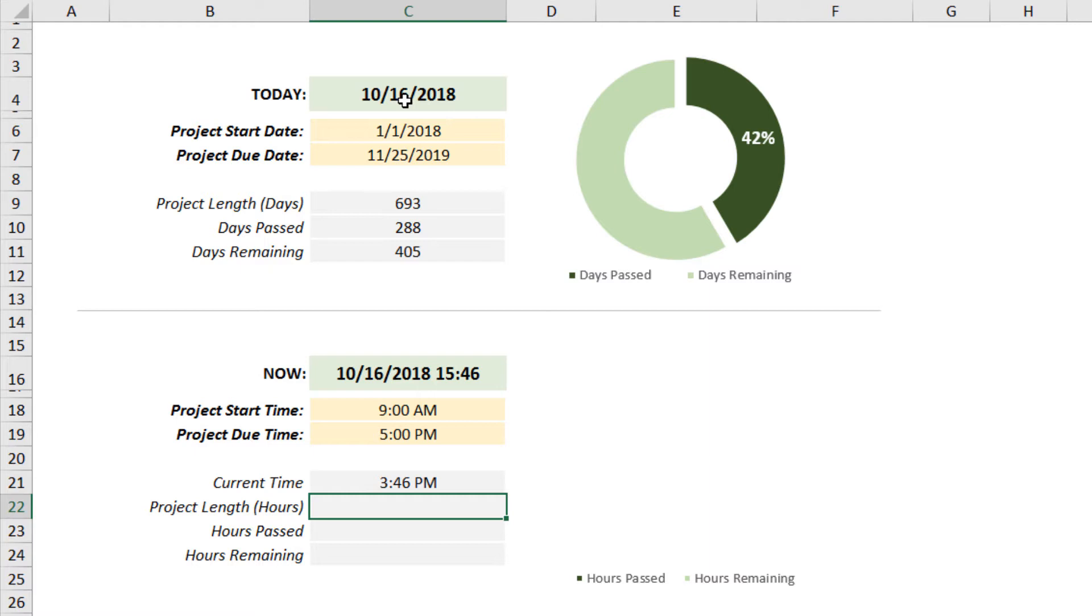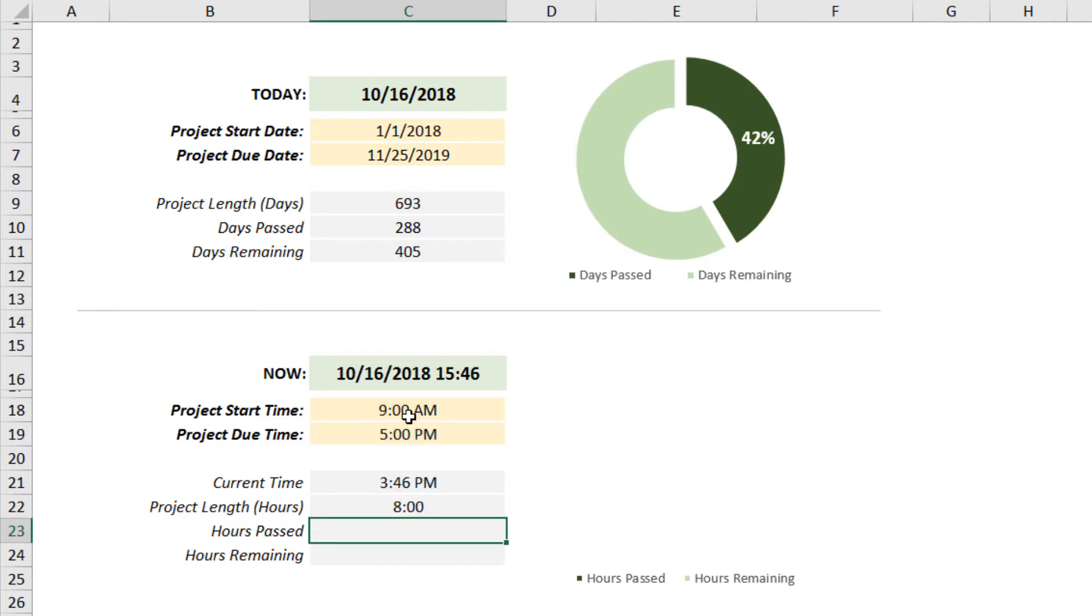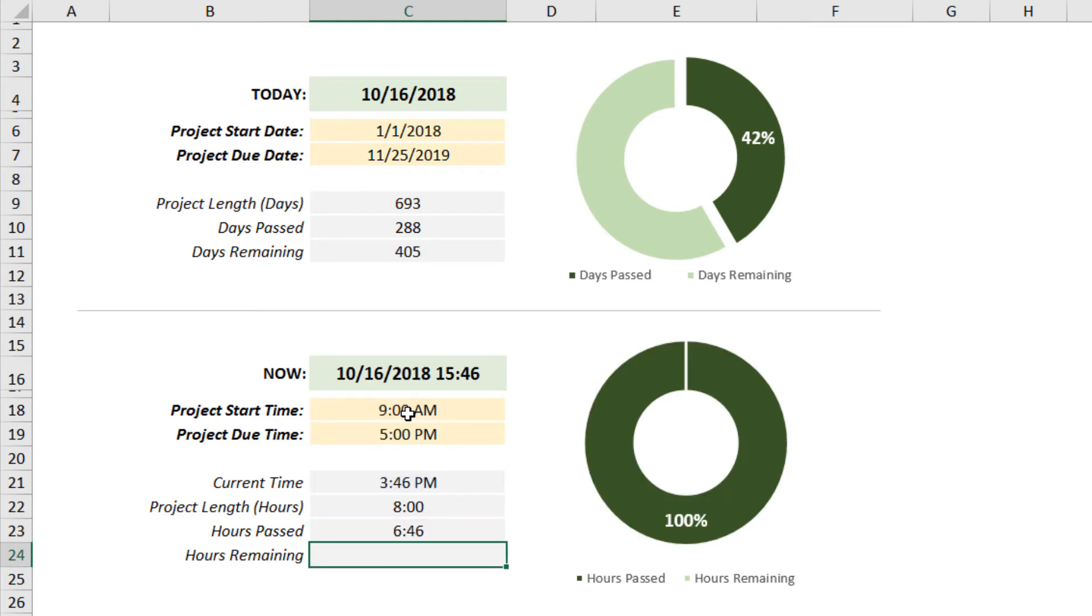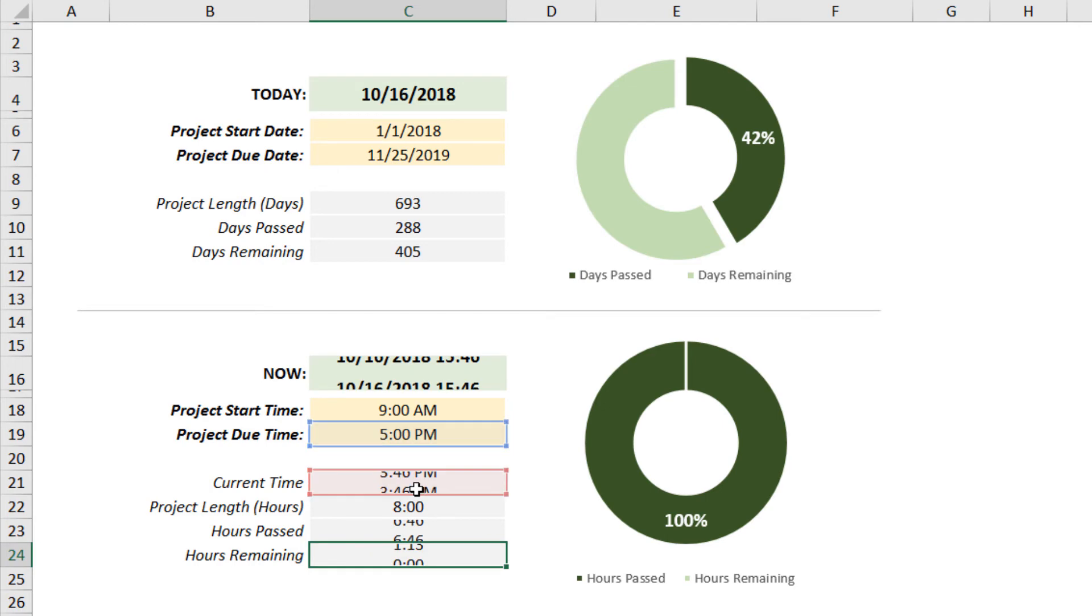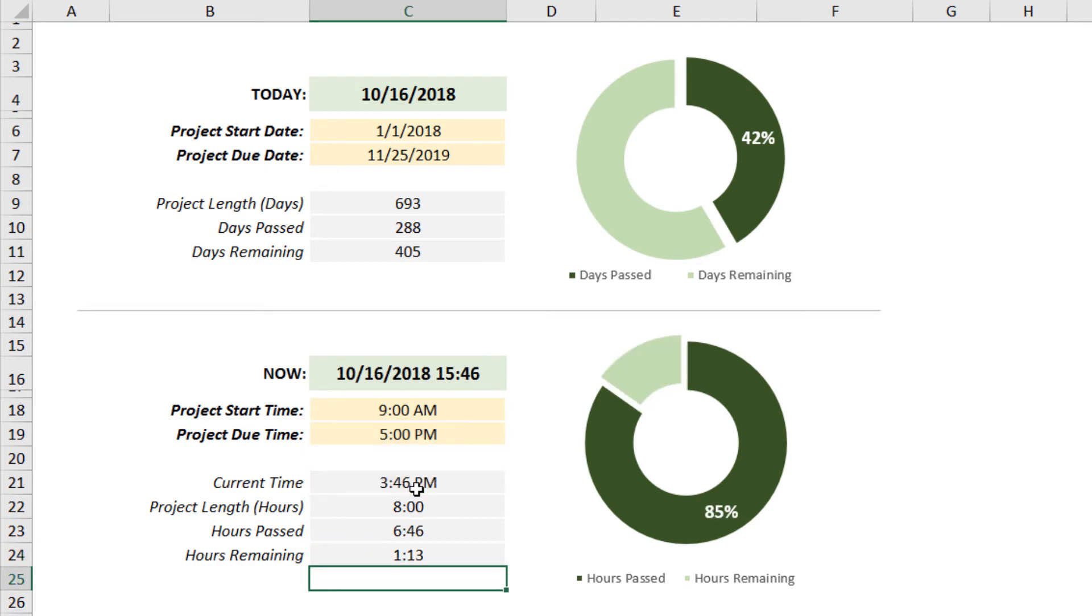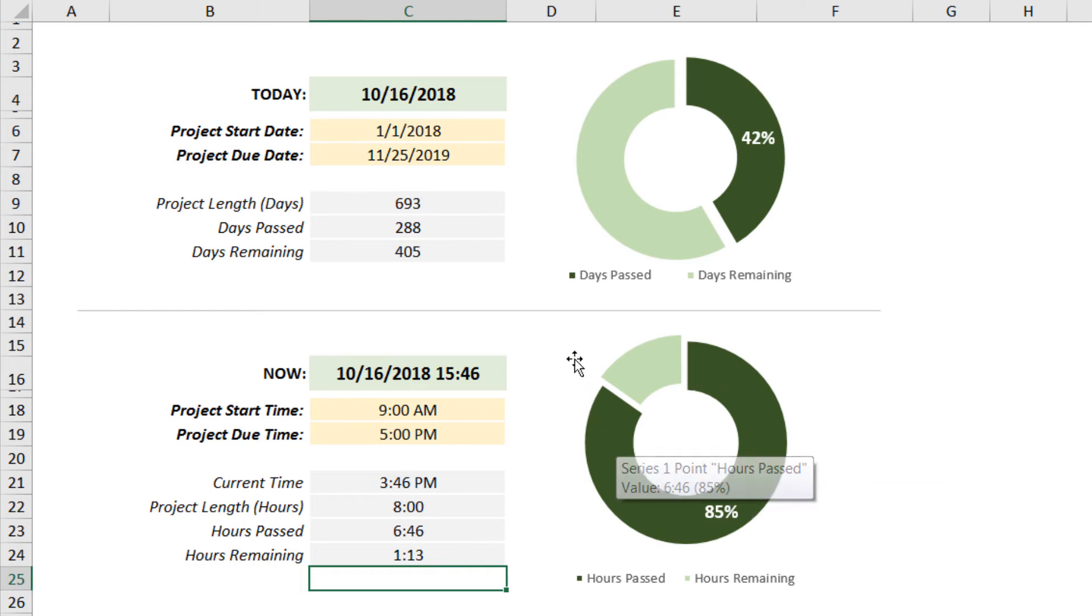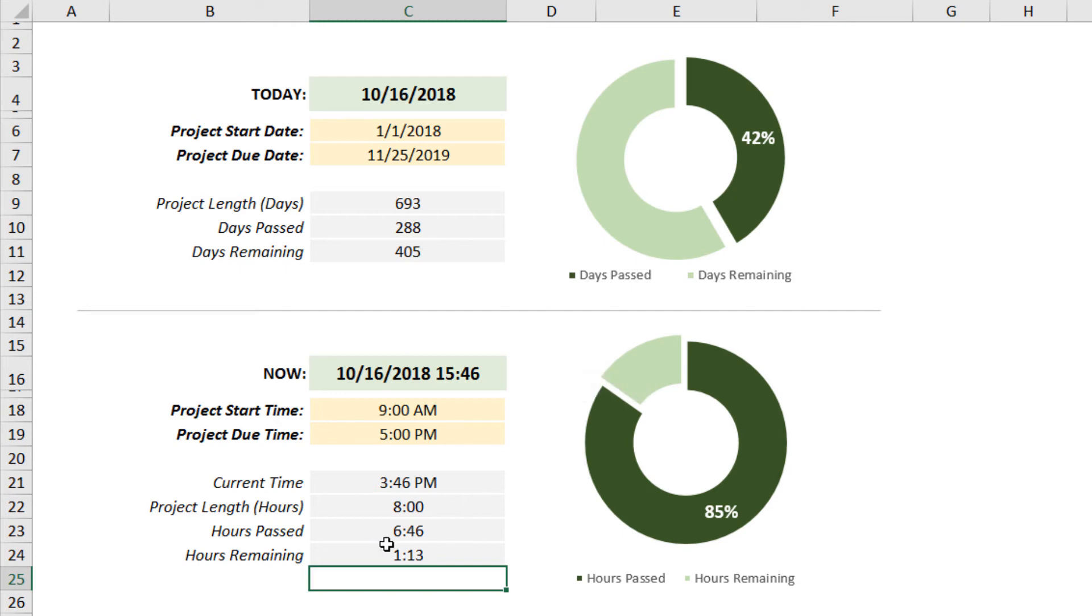Back to the project. To take this to the finish line, we calculate the project length in hours, which is simply the due time minus the start time, C19 minus C18. Hours passed is our current time minus the start time, just like those date calculations we did above. And last, the hours remaining is the due time minus the current time, C19 minus C21. Press Enter. Our project started at 9 AM, it's going to end at 5. Currently it's 3:46, which means I only have an hour and 13 minutes left—I'm 85% of the way through this timeline. I better get cracking if I want to finish this project.